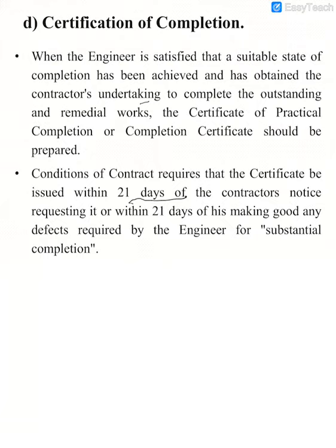Meaning that within 21 days after the contractor requests the certificate, the SO has to issue the certificate. So that is the condition stated in the contract. After 21 days, the certificate has to be issued to the contractor.